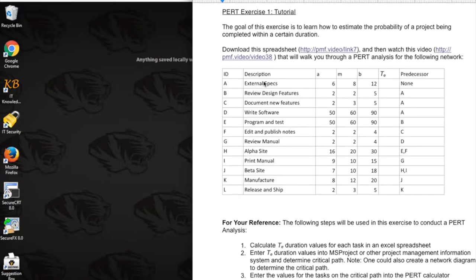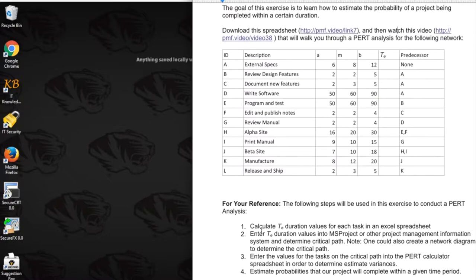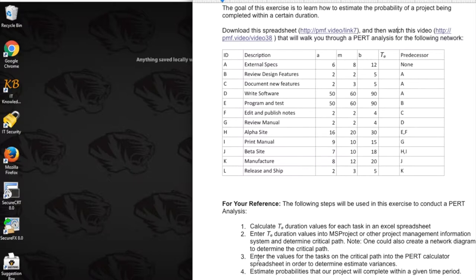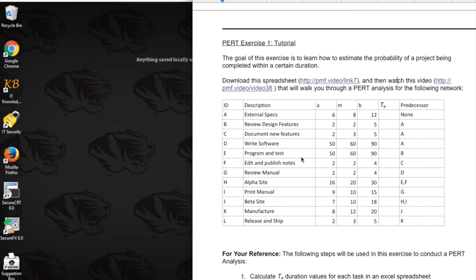What we're going to do here is start out calculating the TE values for each task in an Excel spreadsheet. We're going to put those values into Microsoft Project so we can figure out what the critical path is. We're going to enter those values for the tasks on the critical path into the PERT calculator, and then estimate probabilities that our project will complete within a given time period.